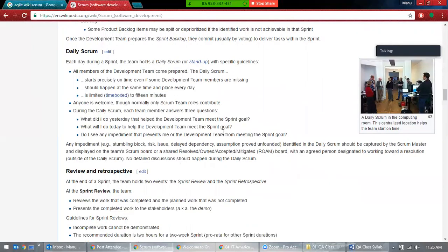We have this next, the daily scrum. The daily scrum is a 15-minute time-boxed meeting. We will discuss these 4 things: What have you done yesterday? What are you going to do today? What are you going to do tomorrow? What are the impediments? It is 15 minutes and should not go more than 30 minutes. If it takes more than 30 minutes, that means you are doing something wrong. It is to be only 15 minutes.